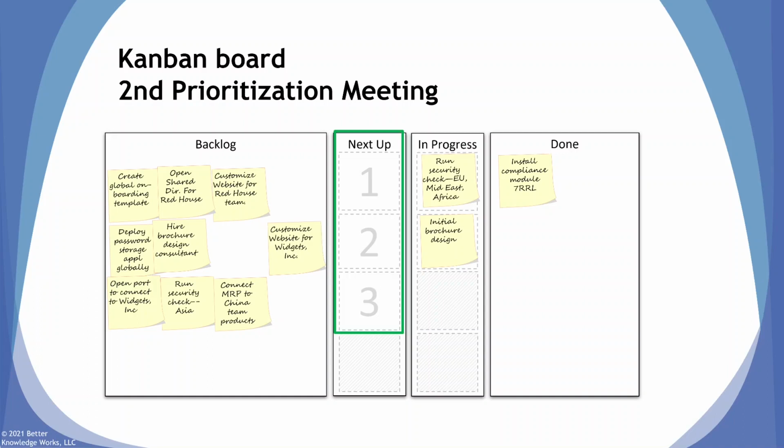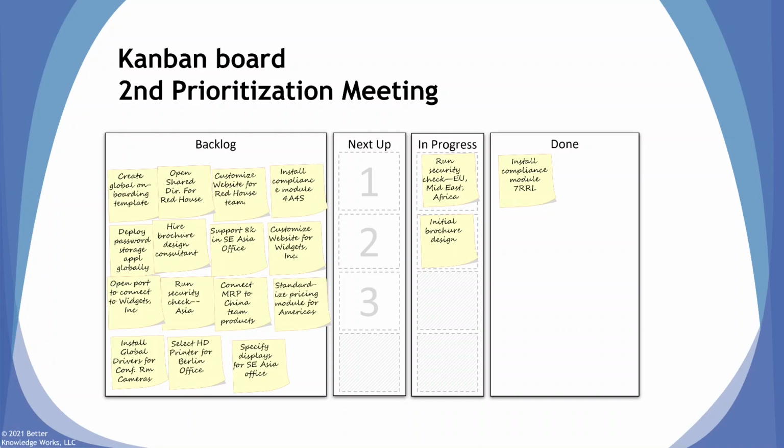This is the just-in-time prioritization. We put things in there just as much as we have to do, and we do no more work on it. So here now we're going to fill the backlog up. Now the backlog is not limited. We can have as many stickers in the backlog as we like. So each week there's going to be new things coming into the backlog.